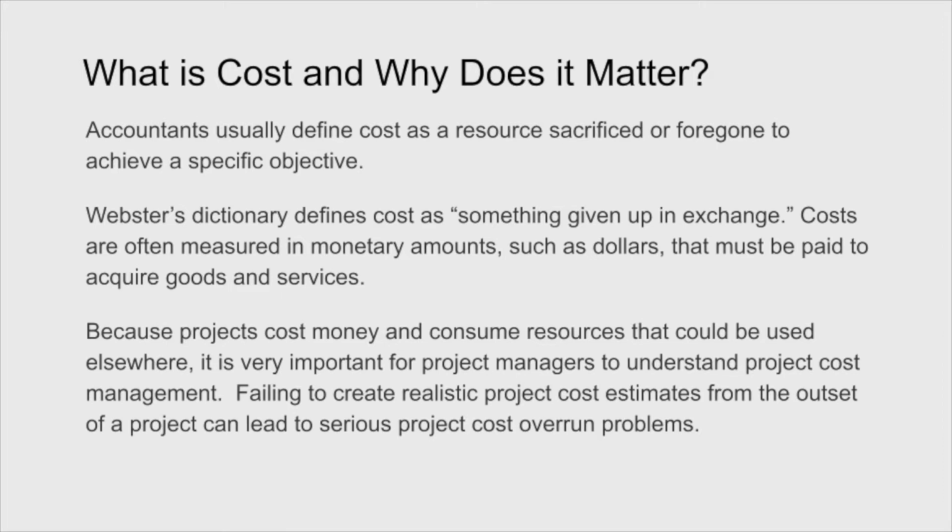Our experience in the world of projects has shown that costs can really get out of control really fast, and this can cause some real problems. I hold up Muskrat Falls as an example. The original cost was $6 billion. It came in over 12. So this is a real challenge for people who have to finance these projects. If you think that it's going to cost 6 and it ends up costing 12, that's a real problem, and it could seriously impact the viability of the company or the organization after the fact.